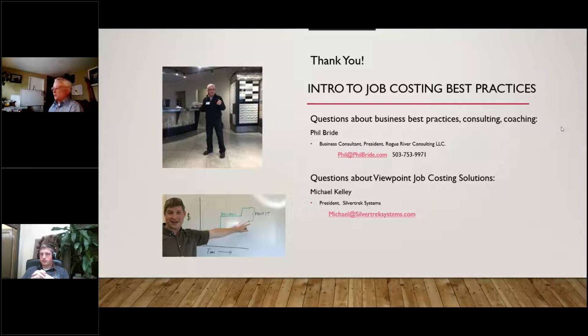Yeah, a simple change order can be as simple as a mini contract: a statement of work of what will be done, and a signature from the owner agreeing that this is the work that's going to be done and how much I'm going to be paid for it.